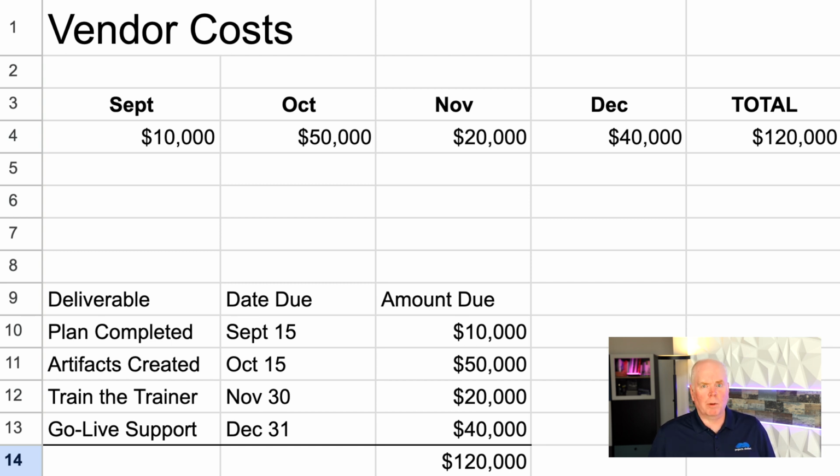So we're assuming that we go live sometime in December. Now, I would actually never recommend going live in December unless it's an absolute must, because everyone starts to check out toward the holidays at the end of the month. But for this scenario, that's the assumption, that it goes live in December and that's the cost for December. So you can see for each month of the project, the costing is a little bit different. But that's great. With all the other costs that we're accumulating, we're going to be able to have a monthly cost for each of the months that we're engaged in the project, as well as a total cost for the year, as well as costs for the future. We're answering all the questions up front.